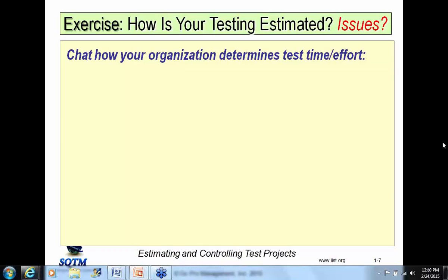Okay, our team submits an LOE, level of effort, for levels of effort and the time needed. Level 0 estimate created based on the evaluations of features needed to test. Okay. How many people are needed to test? About 45% of development time. We generally do 30% of development time. Okay. Like an upgrade, how long did it take last time, and so forth. Okay. And test cases, quantity estimation, 50% of development time for level 0, and so forth.